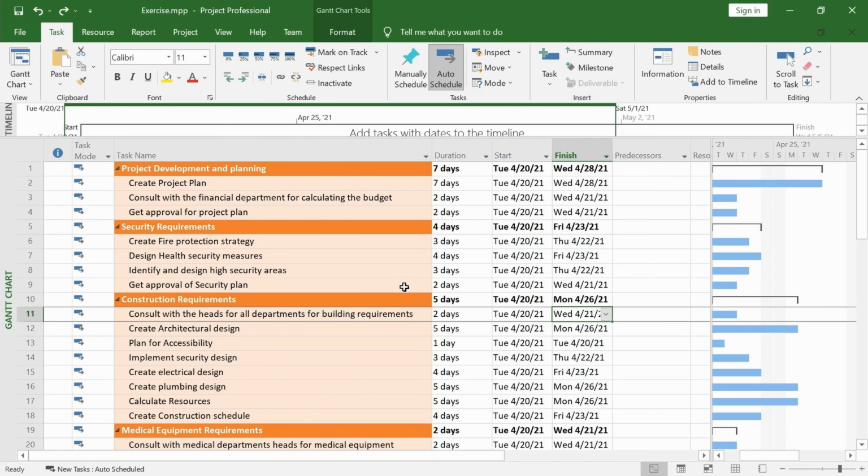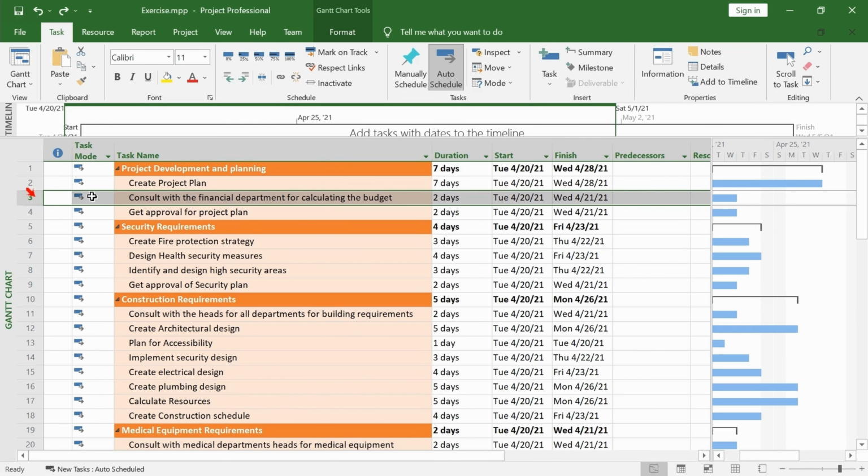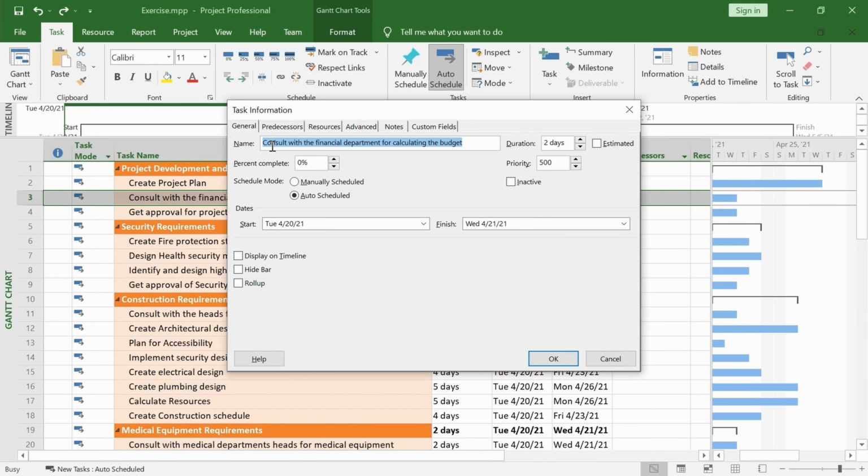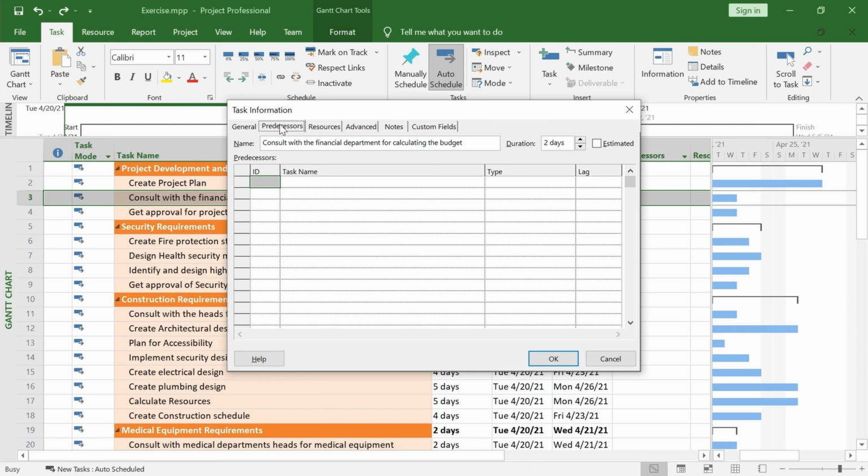We will make sure that the second task of the link cannot finish before the first task of the link has started. We don't want to change the project start date in the process, so we may have to do a small adjustment. Find task 3, double-click on it, go to the predecessors tab, add task 2 to the list, change the link type to start to finish.